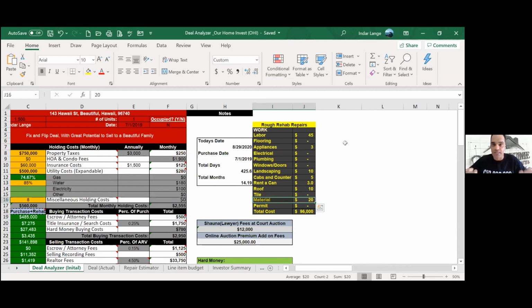I am a penny pincher, guys. Penny pinching is not bad. So controlling my materials is a huge way. And it's easier for the contractor to bid, because now he can work on man hours, and you can calculate it really easy. 3 guys a day, here in Hawaii, an average of 200 to 250 a day. Say it's 250 a day, a guy, times 8 weeks. Do that math real fast. 3 guys times 8 weeks at 5 days a week. That's about 30 grand. So you can do the math really quick and know where he should be at when he tells you 8 weeks or 6 weeks. You know where he should be at, and you can see if they're scammy or not.